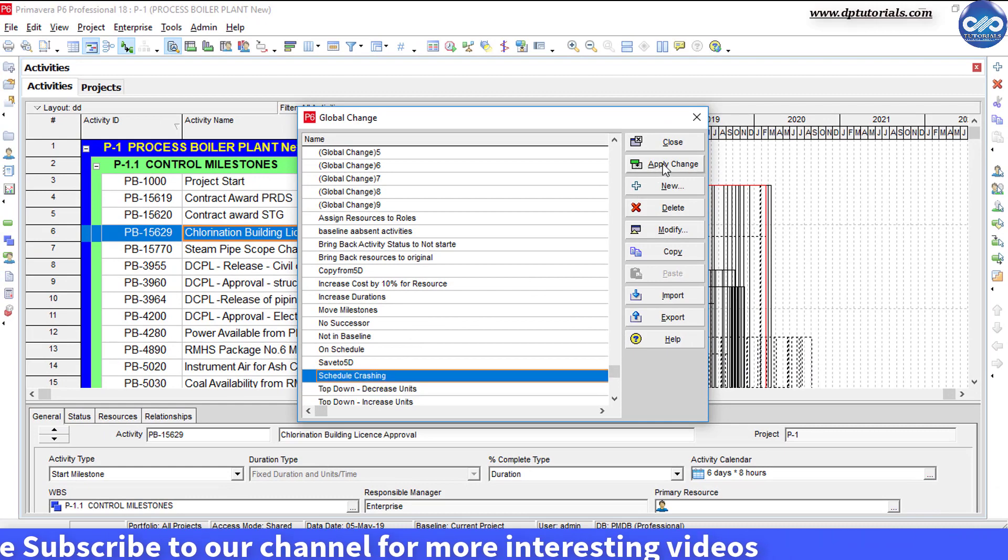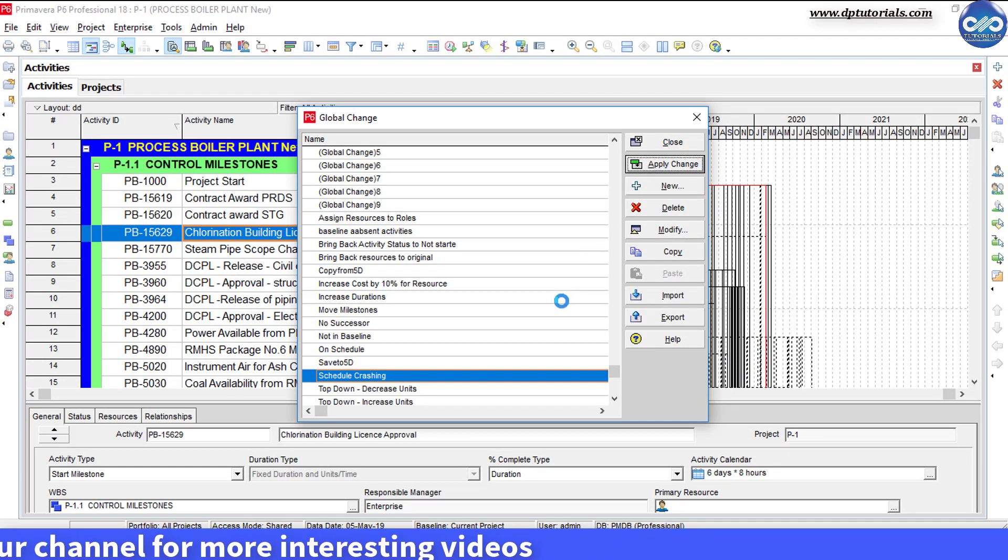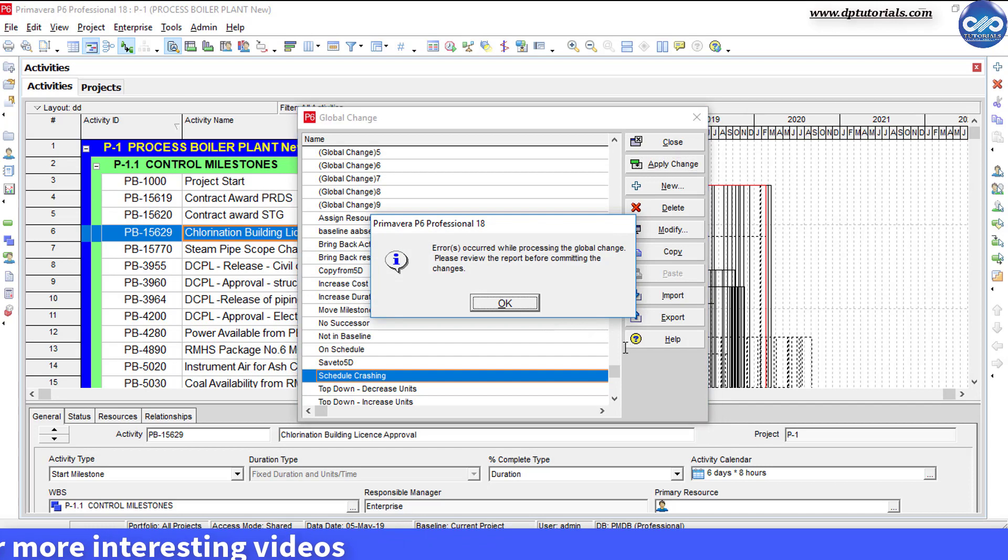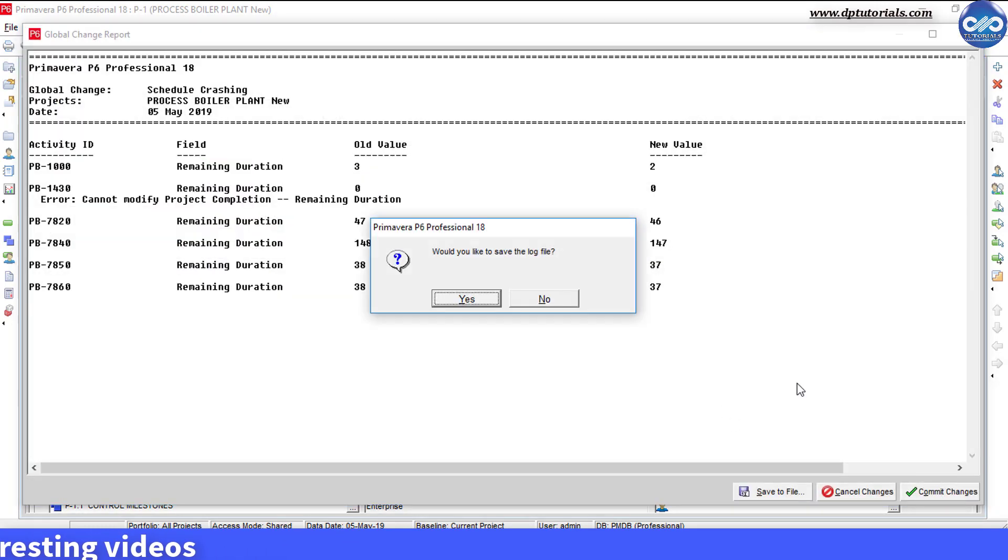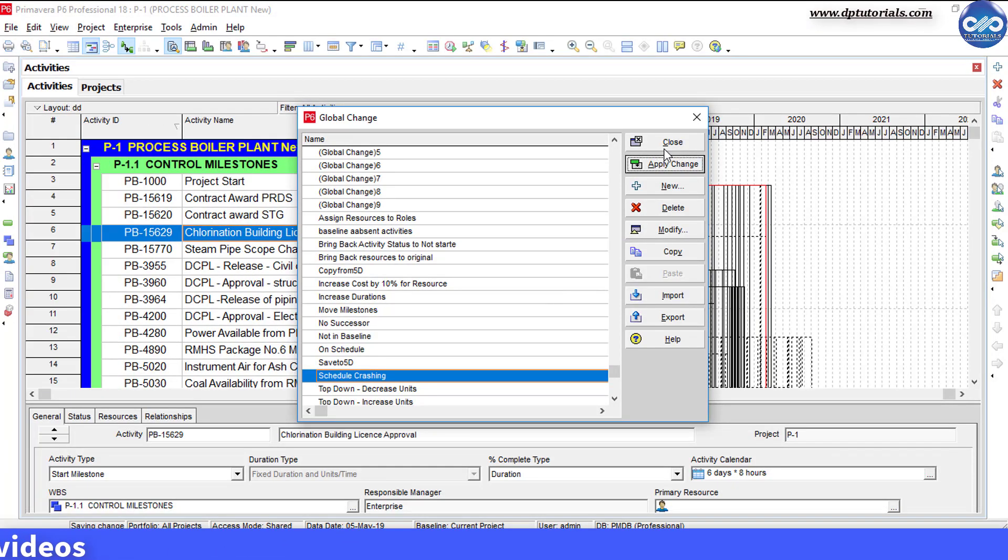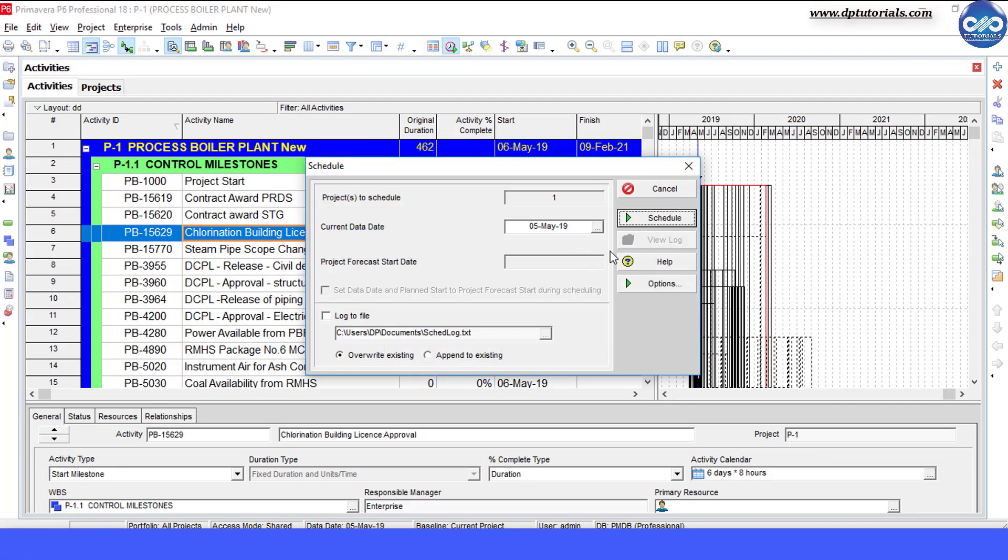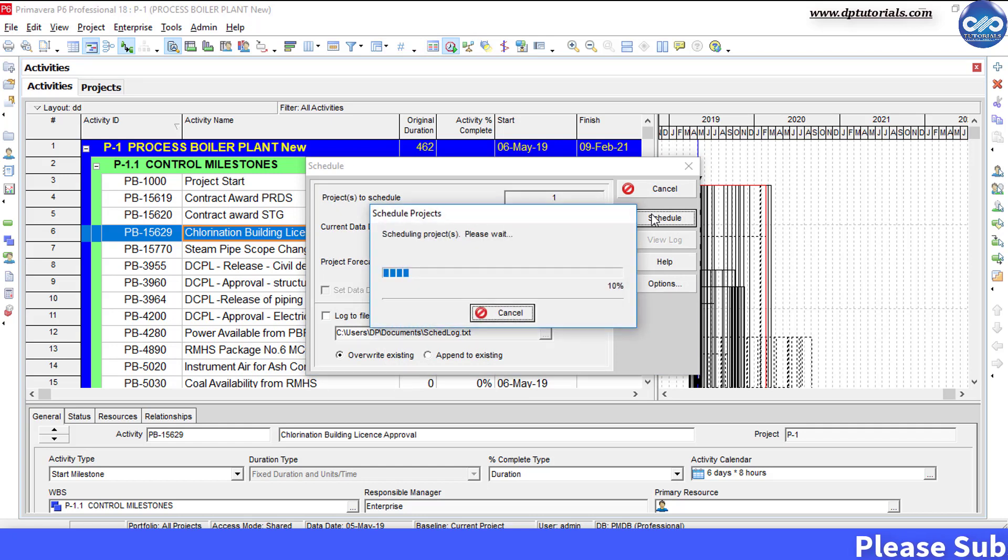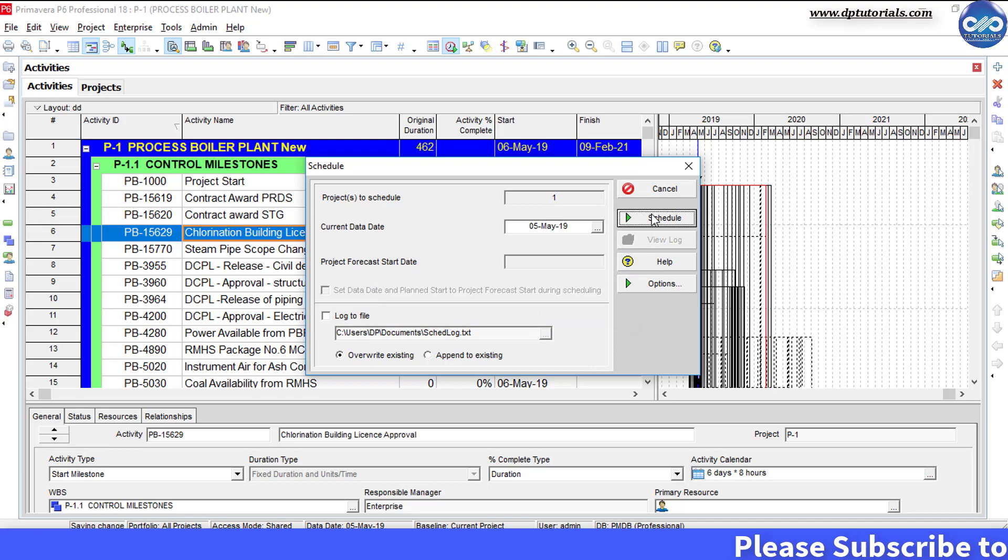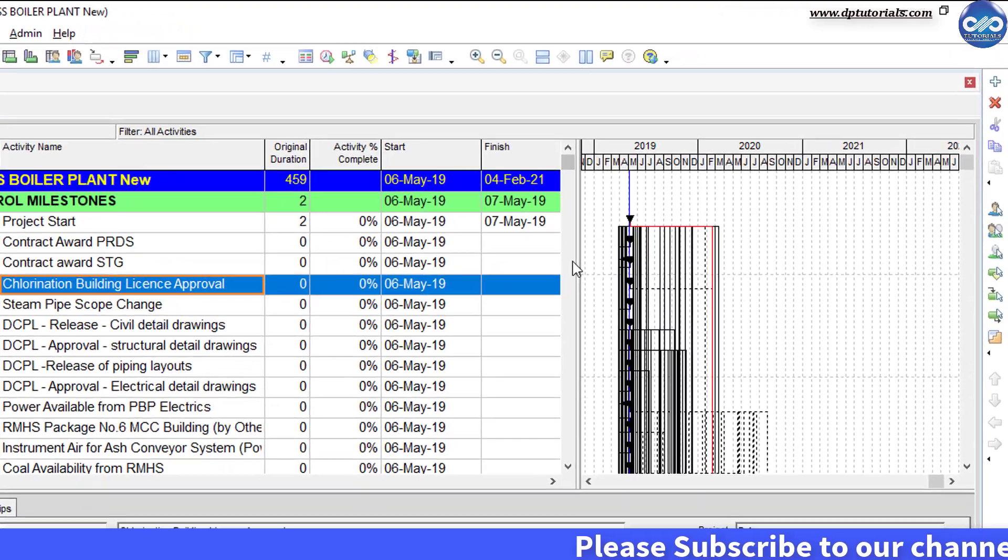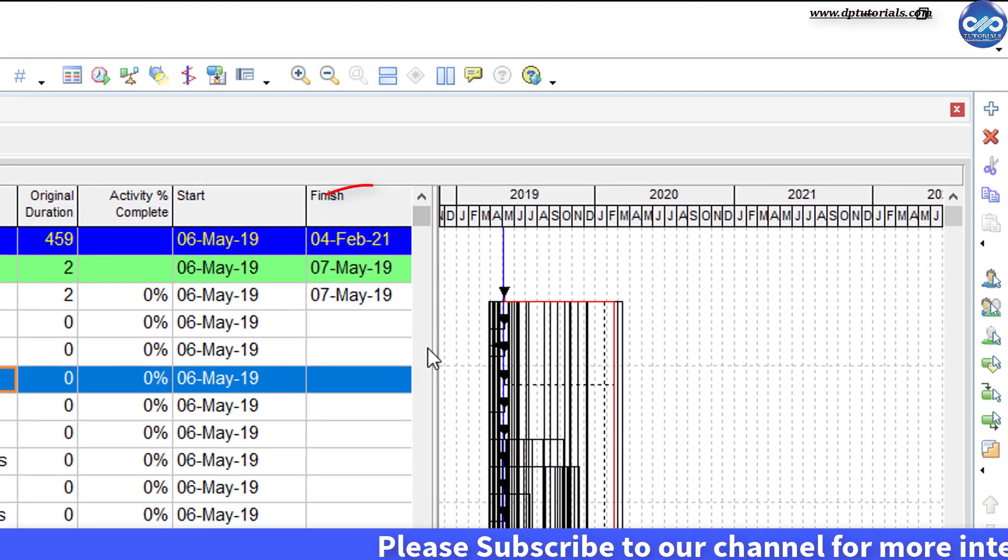Remember friends, by this global change, critical activities might have changed and a new critical path will be derived. If you want to still compress the schedule further, run the global change for one more time, by which you will reduce the duration of the newly formed critical activities. Repeat this process until you reach closer to your desired project finish date.